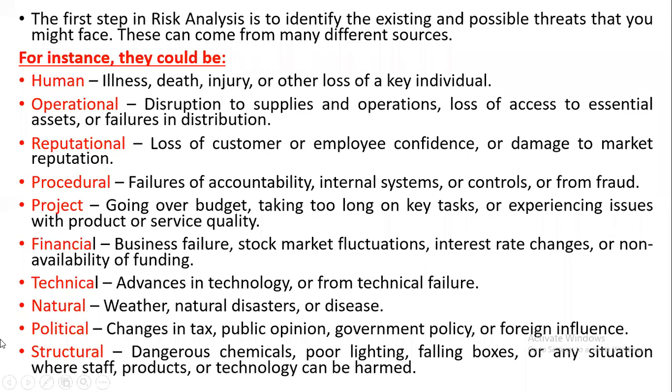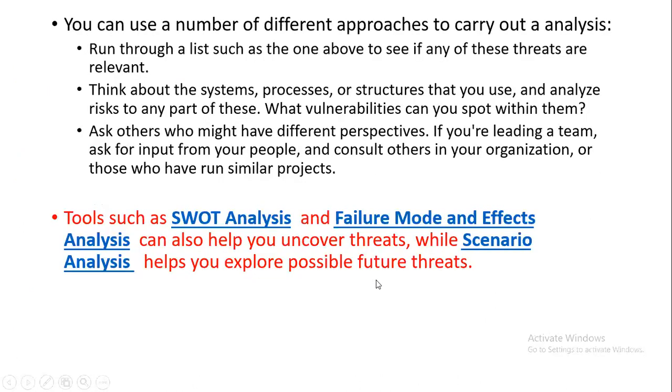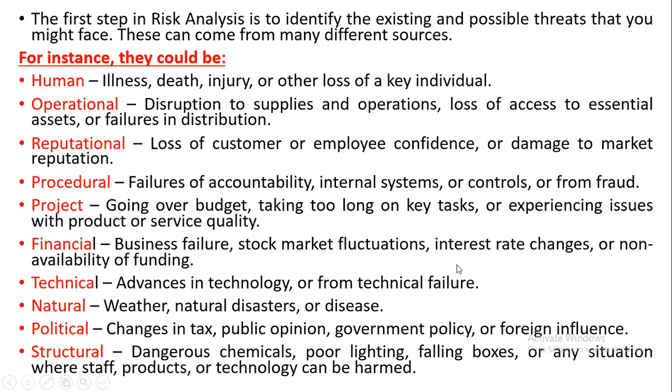So the next one is technical. So how you are going to use advances in technology, and when you are using that, what is the risk involved? Otherwise, if any technical failure happens, how are you going to deal with it? As I told, in the manufacturing industry, we will have big machines, right? If any machine is down for even one or two days and you are unable to fix it immediately, that will be a huge loss. You can't meet your deadlines. So that risk also you need to analyze.